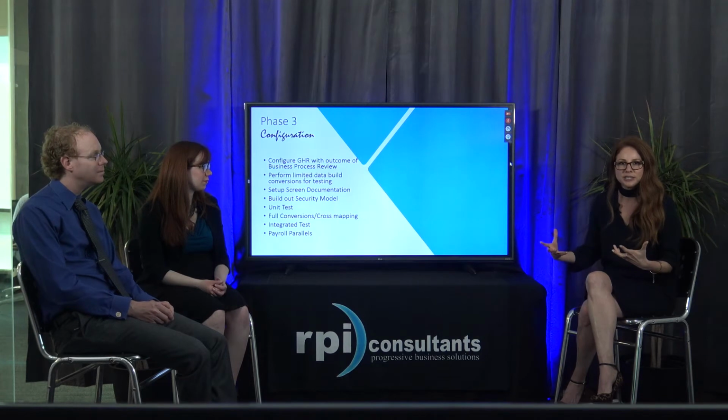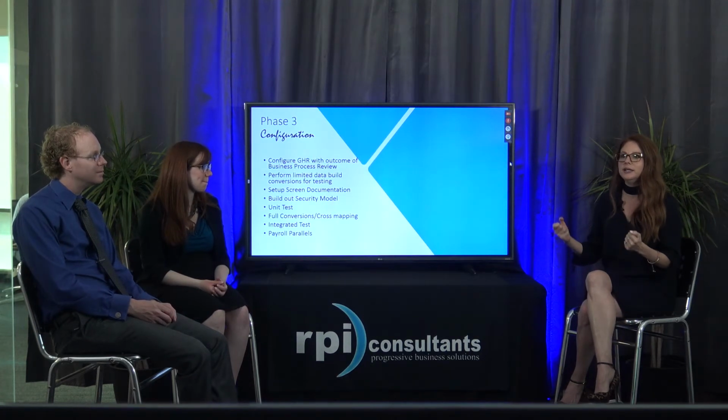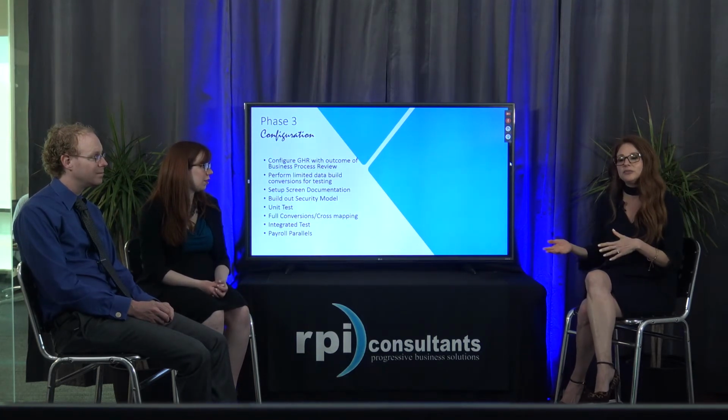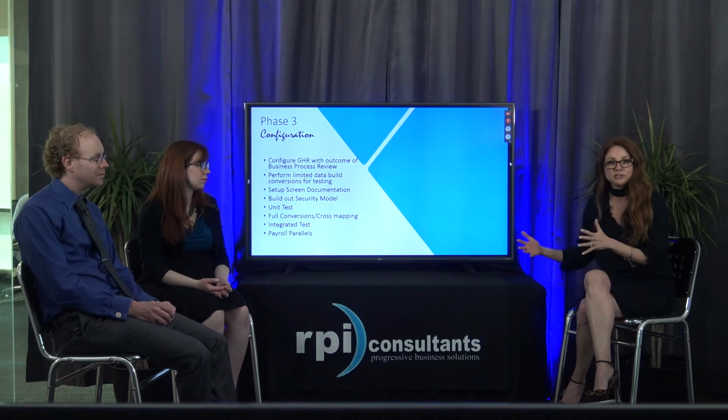All the screens work as you expect them to do. Your organization looks as you expect it to look. Most likely not a full test with all of your conversions. This is helpful, because conversions are such a big, hairy process. Your conversions are most likely not going to be ready by the time you're ready to initially test out your build. So you don't want to be dependent on whomever is working on your conversions to get everything in before you're able to do your first testing.